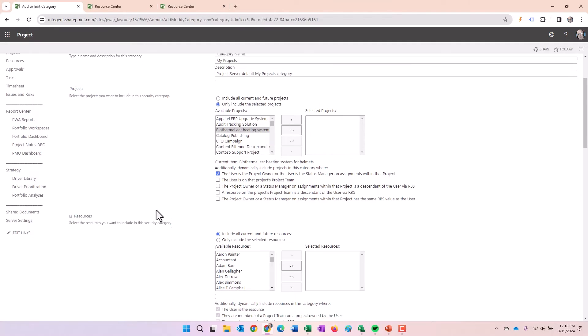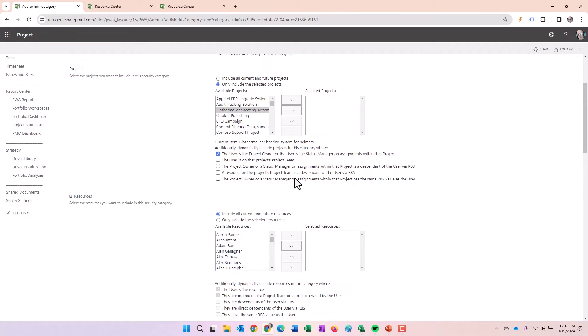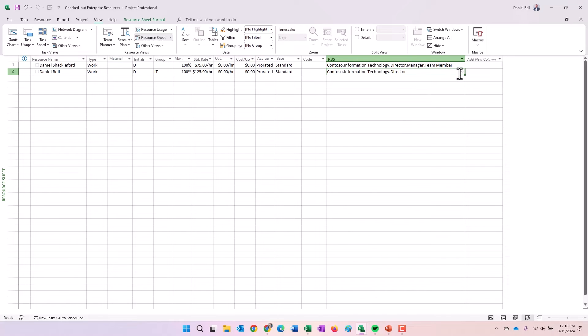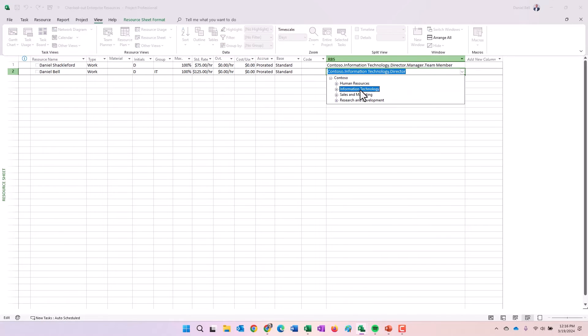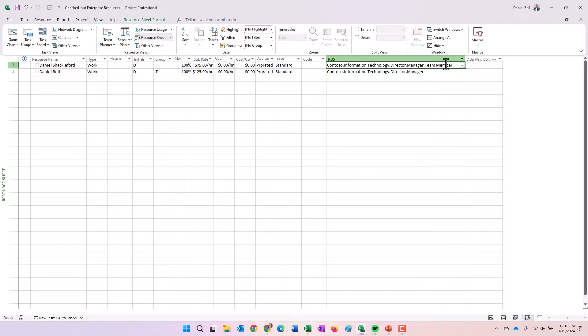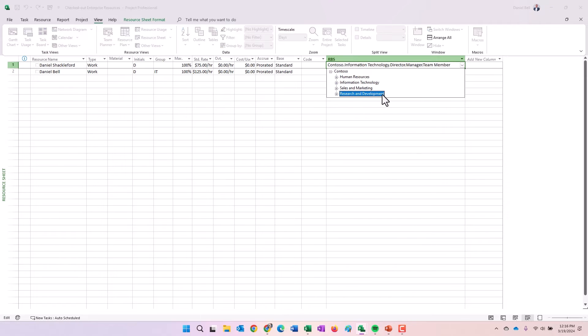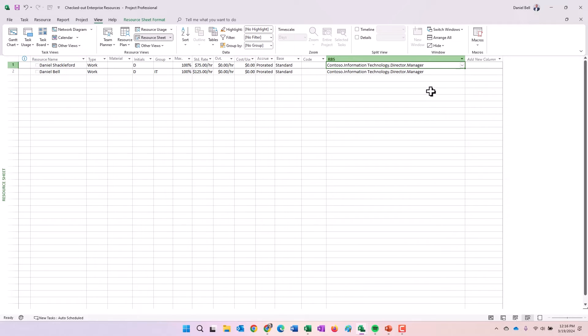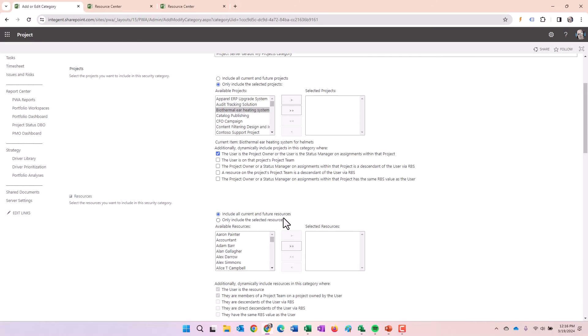And then lastly, the project owner or status manager on assignments within the project has the same RBS value as user, probably pretty straightforward, but again, we're going to go ahead and take a peek at that as well. So I'm a director. Let's assume that maybe I'm a manager. And then let's go back here and assume that just maybe, peers. So we're on the same level within the resource breakdown structure. I would be able to see that person's projects.